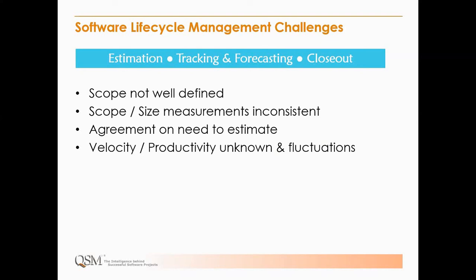In Agile particularly, there may not even be agreement on the need to estimate. Velocity and productivity is either unknown, fluctuating, or unstable — most people readily admit velocity is not constant. Historical data is not available, which is always a challenge. We always want to base estimates on our known capabilities. In the Agile world, when some folks talk about history, they mean just the prior sprints in a release — that's history at a very small, team level.